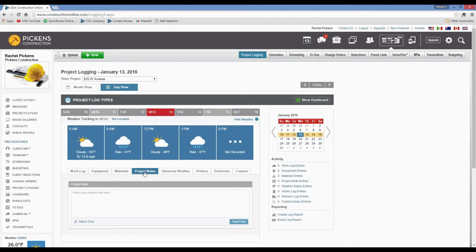In terms of discrepancies, in terms of whose work is supposed to do something, let's say the plumber is saying that they've installed a pipe too close, and the HVAC guy is going to say, well, there's a problem here. Well, whose fault is it? You've got to record accurate records of what actually happened, describe the events, and now you've got a detailed record that you can look back at and understand, okay, what are the facts of the situation?